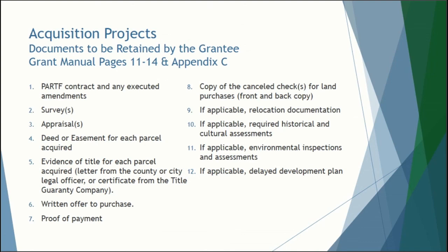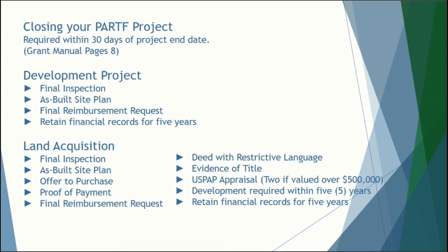This is a little repetitious but worth mentioning. Please maintain these items in your project file. In order to close your project, closing documentation must be received within 30 days of the project end date. Please reference this list on page 8 in the grant manual.